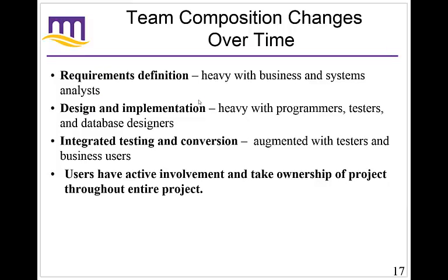So even once you have your project team, you have to realize that the team is going to change over time depending on who you need to do specific parts. Specifically, early in the requirements definition, which we'll get to in a second here, you're going to need a lot of time from the business and systems analysts, and particularly working with a lot of the users too, to try to get a clear idea of what needs to be accomplished. But later in the design and implementation, you don't need such a heavy emphasis on the analysts and the users. Now you need much more effort from the programmers and testers and database designers.